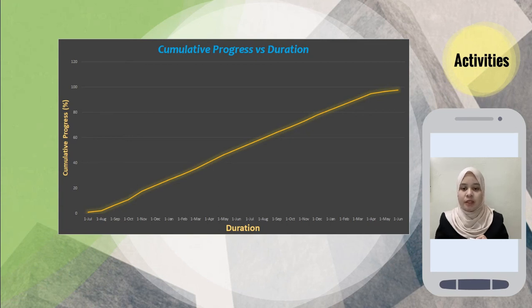Actual duration by cumulative progress needs to be compared with the planned S-curve. For example, extended progress of work at the beginning will result in delay of work in the middle or end of the project. If the project is completed on the end date of this S-curve, then the project spent considerably less on labor than was planned. This can be good for the project, especially if there were no cost overruns on materials.